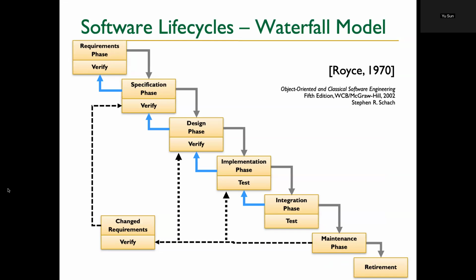And then our developers start work on the design, 2 months. And then we write the code for 2 months. And then we do testing and integration for 2 months. And then 10 months is gone. And now you start to test it with the customer, and they tell you, no, this is not right. And then the 10 months is gone, and there's nothing you can do about it. You just run out of schedule.